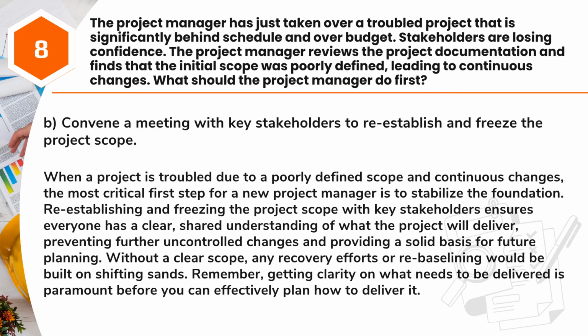Answer. B. Convene a meeting with key stakeholders to re-establish and freeze the project's scope. When a project is troubled due to a poorly defined scope and continuous changes, the most critical first step for a new project manager is to stabilize the foundation. Re-establishing and freezing the project scope with key stakeholders ensures everyone has a clear, shared understanding of what the project will deliver, preventing further uncontrolled changes and providing a solid basis for future planning.